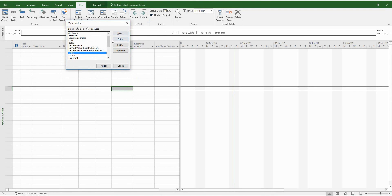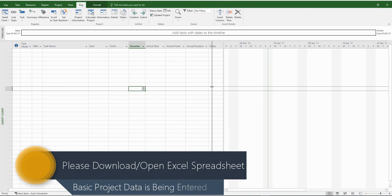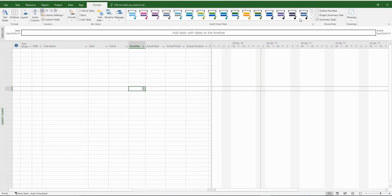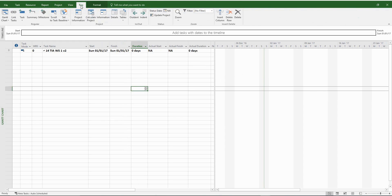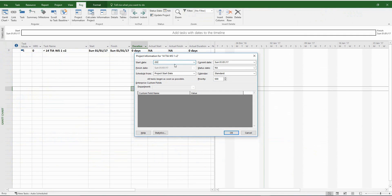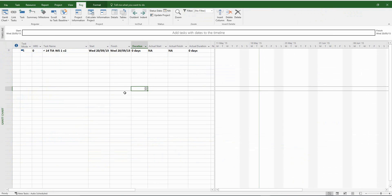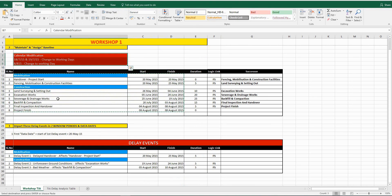Now we're going to carry out a time impact analysis in MS Project. Follow this video very carefully — you may have to watch it a few times to understand the whole procedure. From a big picture perspective, it's not too complicated. You just have to progress the program to a status date or data date when a delay event took place, insert the delay event, make it zero, reanalyze the schedule to make sure there's no change to the finish date or any milestones, then increase the zero duration to the amount of delay incurred and reschedule. You need a baseline before scheduling at zero delay duration and another baseline after it's been scheduled with the correct delay duration. This step keeps getting repeated for each and every delay event — this is the basic logic and principle of a time impact analysis.